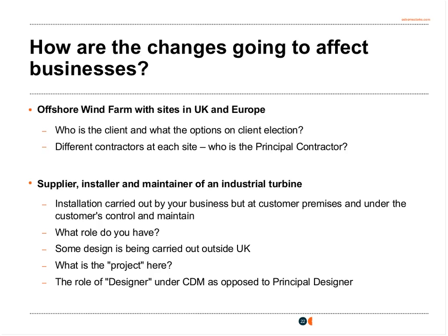Is the ongoing maintenance counted as construction phase? Well, we think that it is. Maintenance is specifically included as construction work under the definition we looked at, so it is presumed that this maintenance contract will still count as construction phase. So what does this mean for your business in this particular scenario? Well, that might depend on whether the CDM trigger for appointments has kicked in.